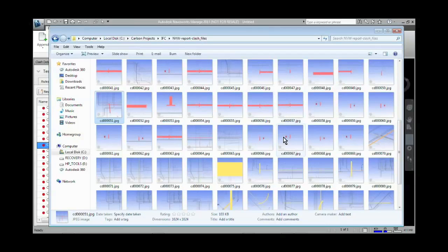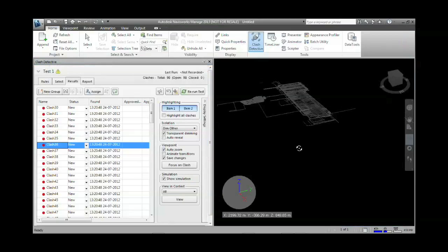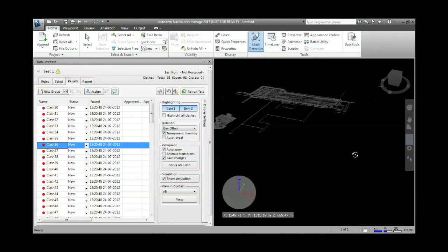And you can also go by classification. So you could just look at water lines, or you could look at water and sanitary and electric all passing through a conduit. So this is what the BIM is allowing us to do now. You can see here that I have the entire facility, including our new design of the building from Revit and the surface from Carlson software. I would then inspect my clashes, rectify them, run it until it has no more clashes, and if that's the case, I would then go to construction. So very simply and in a nutshell, that's what the BIM is for.